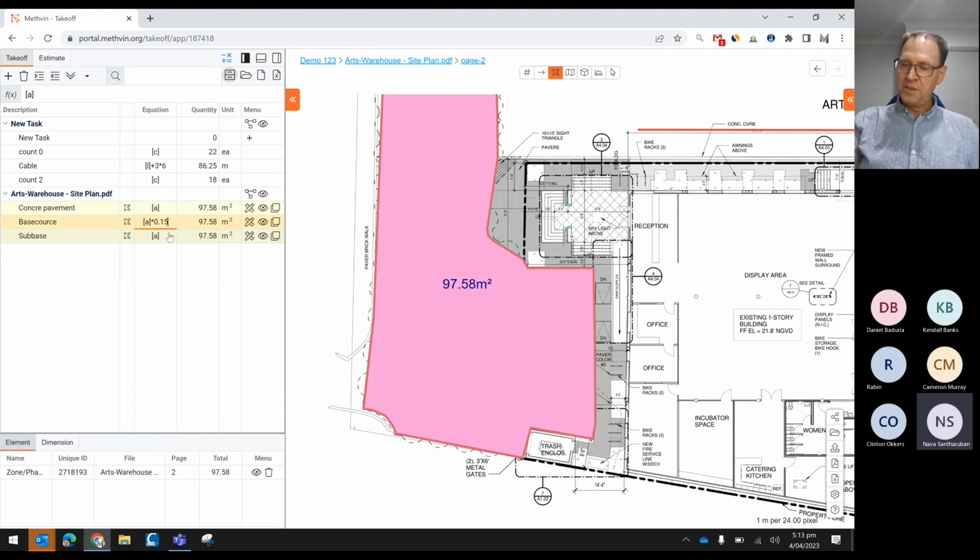And then you could also go times by, and we've got a set variable called S kilograms, which will give you the density. What am I saying? Daydreaming. Sorry. So it would be times 2.4 for tons per meter cube, just to help understand what we're doing here. And this you could say 150 millimeters thick.